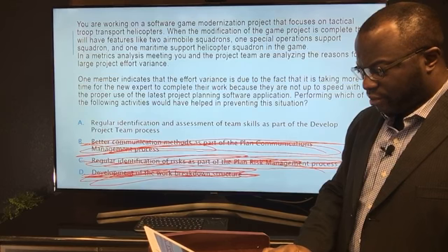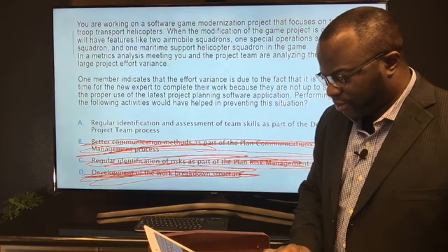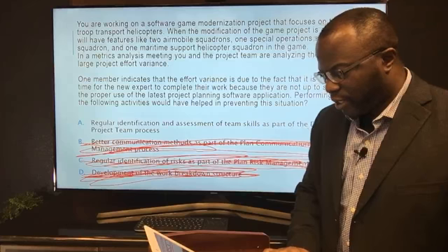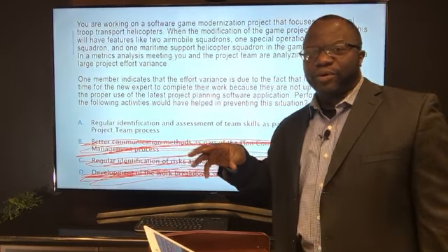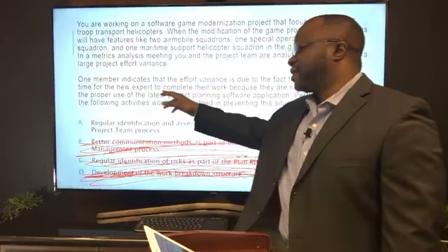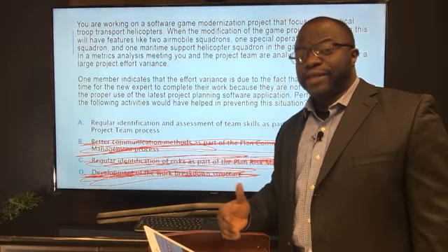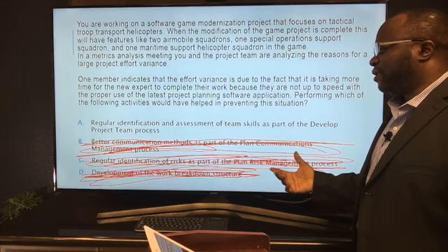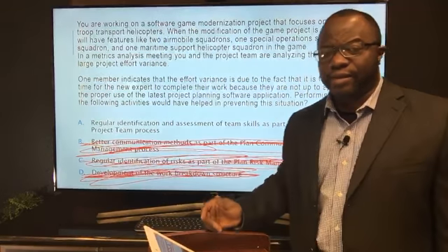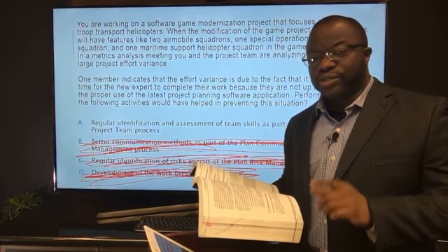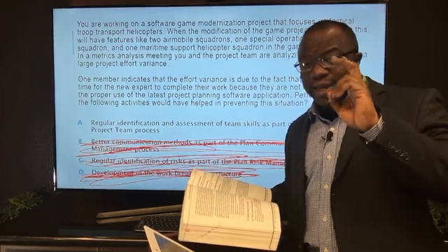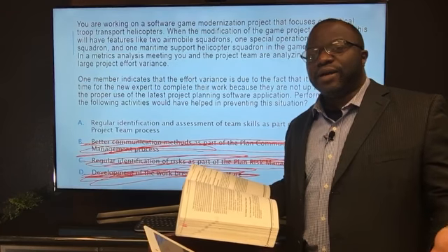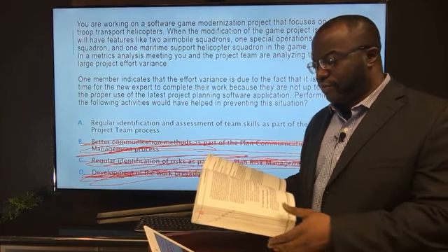All right? So that was Amjid's question. Ken says, but you knew his level of experience when he was brought on. It should not be A. So this person coming on board, it says new expert. New expert kind of alludes to the fact that this person is new to the project and may not have been on right from the beginning. So the right thing to have done, of course, is to assess their skills coming in. Okay? And assessing of skills does not just happen in the beginning planning. No. It happens as part of your assessing the requirements. And after you've assessed the requirements, you still continue to do so throughout the project.